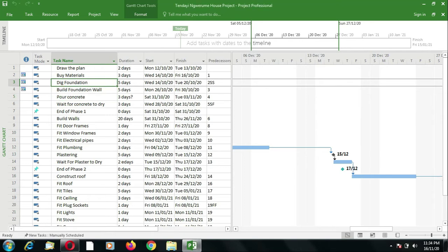There are two basic ways that you can put a summary task on your project. Firstly, you can put it like any ordinary task, and they are all on the same level. Then once you've got all the tasks on your plan, you then promote the tasks that you want to become summary tasks. So at first they start as ordinary tasks, then you select the ones that you'd like to promote to be summary tasks. The second way is to insert a new summary task.